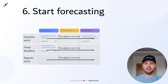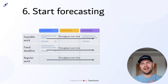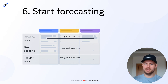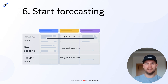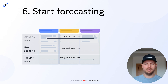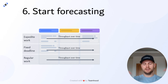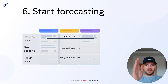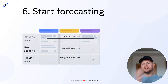Once you have those measurements and you measure both steps of the flow — the pre-work and the actual work — you will start getting an understanding of how much time it takes for specific types of work or specific batches of work to be done. This will be your main tool to align with other stakeholders, to give forecasts, and get the knowledge that answers the questions we raised before: when is the thing going to be finished, when do we expect to do something? You take your items which are not yet started, apply queuing, and you see that each batch of throughput is in your queue — so in the next month you'll do the first ten items, in another month the second dozen, and that's how you can do it.